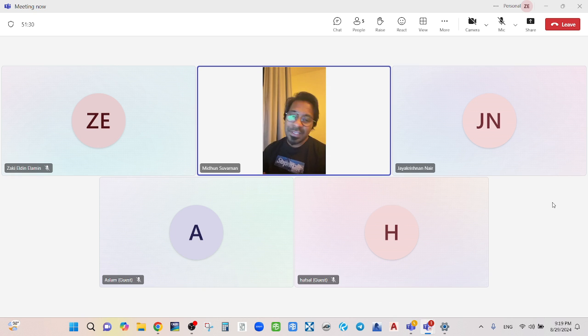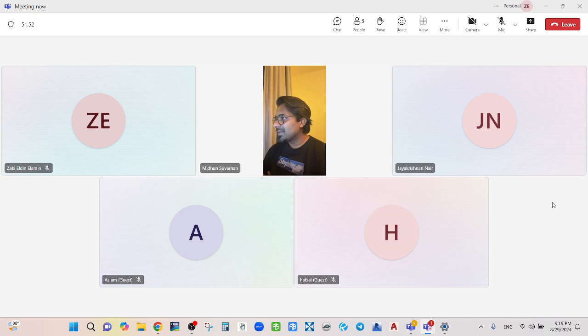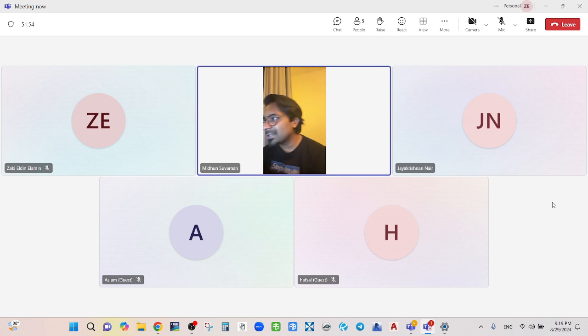So he knows that this 5% is the tender bond value. 500,000 means I'm going to submit 10 million. So what does he do? He will smartly put 9.5 million and submit the bid, so that I will be at 10 million and he will be at 9.8 or something, and he will get the bid. He will win the bid actually. Okay, clear?